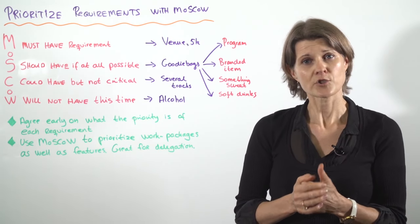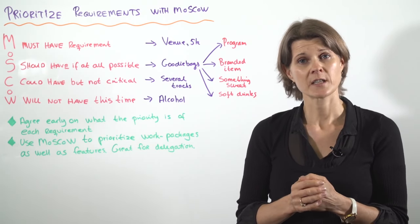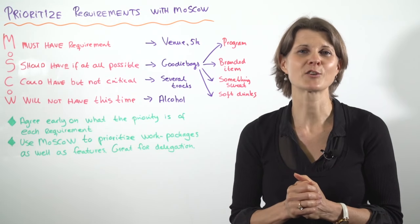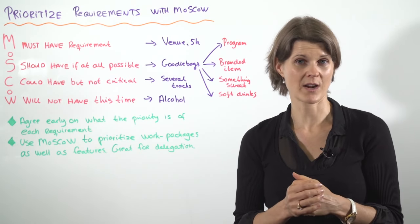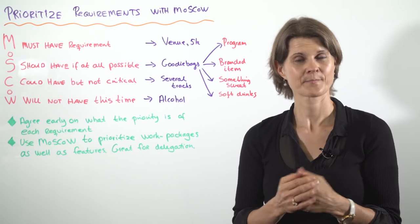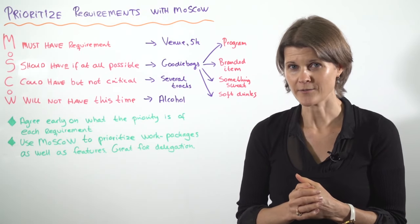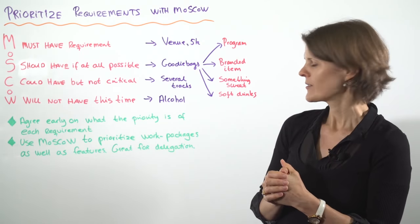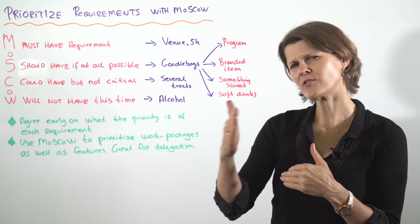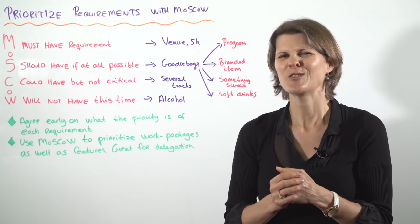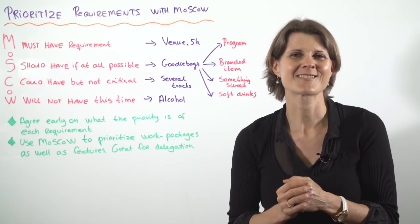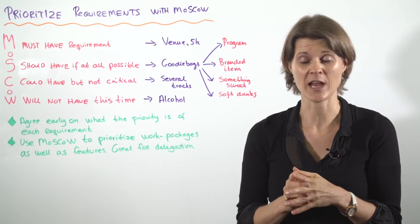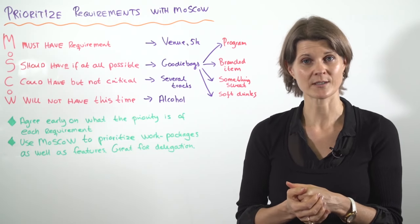What should we have if at all possible? Well, we should really have a goodie bag for each delegate to walk away with. What could we have? We could have several tracks of speakers, but really it's not that important — it's a nice to have if we have extra time and budget.